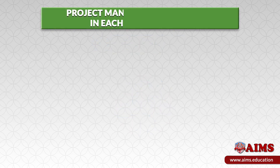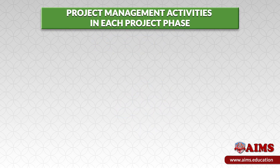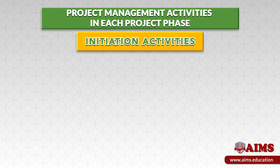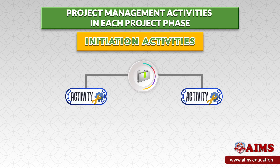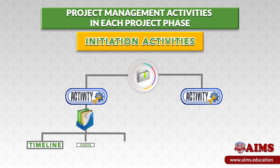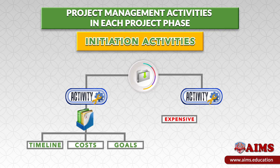Now let us look at the project management activities in each project phase. Initiation activities: there are two major activities that take place during this step — the creation of the business case document to justify the project, and a feasibility study to ensure that the timeline, costs, and goals are set. If the project is deemed unjustifiable, too expensive, or too time consuming, it can be abandoned with little cost at this point.